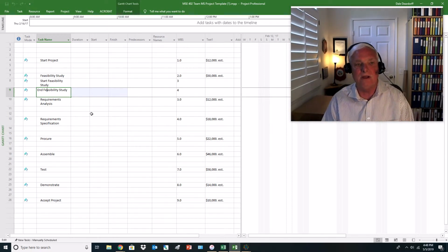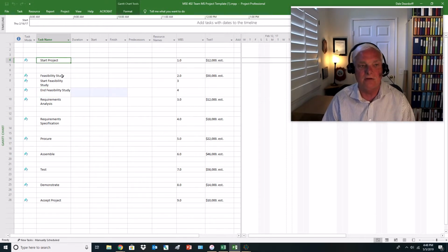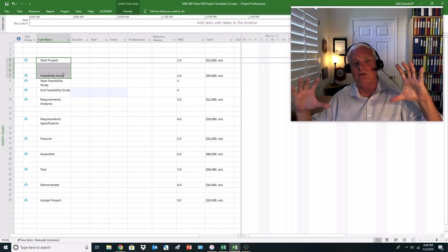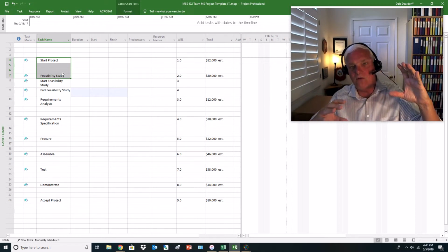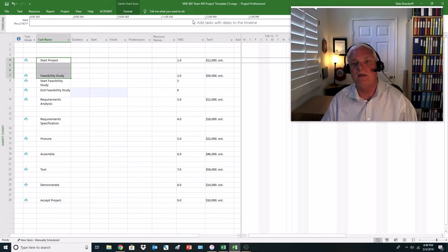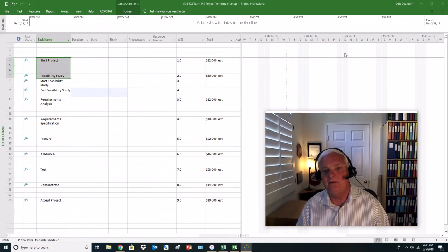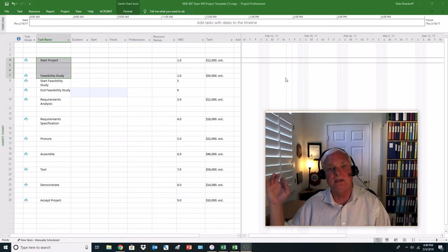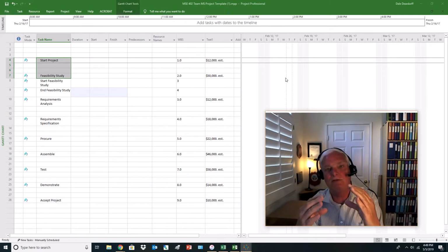And then once we're done with that, you can do a hierarchical linking. You can grab 2 of these areas and then just go up and use the chain command from a functional standpoint, and you'll be able to see these in the menu structure. And what you're going to do is you're going to link those. And once you've got those linked, you'll understand what your project looks like. That whole flow of a Gantt chart will show up on the other side. So in this area over here, the dates will start to pop in because you'll put your start date for your project and theoretically your end date, and then you're going to fit those pieces together.